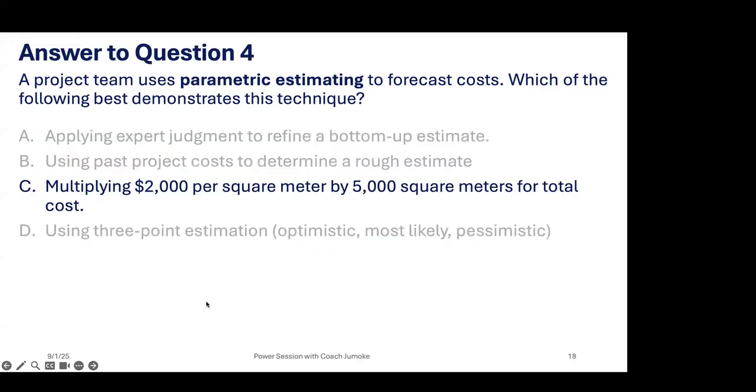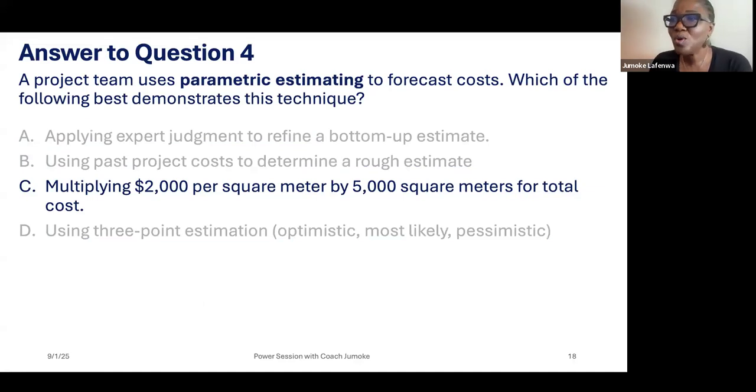Thank you. That's what parametric is. Let's say you got an order to sew clothes for a 250-member car. You ask, okay, how much will it cost? I'm not very sure. Let's estimate 4 yards per member, and a yard is 10 cedi. So it's 10 times 4, that's 40 Ghana cedi for fabric for each of the 250 people.